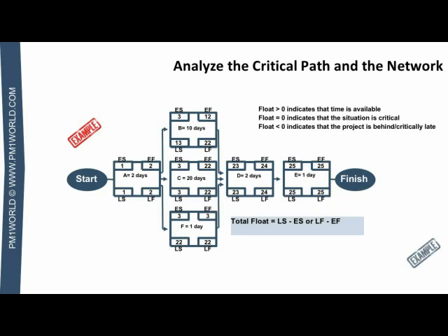Although you will not need to do any complex scheduling questions or calculations for the exam, you should understand that in a network diagram, activities usually have 4 different dates. An activity can have the earliest it can start, the earliest it can finish, the latest it can start, and the latest it finishes. And the software usually behind the scenes is using all the calculations to determine the float activities have, which activities are on the critical path, etc.